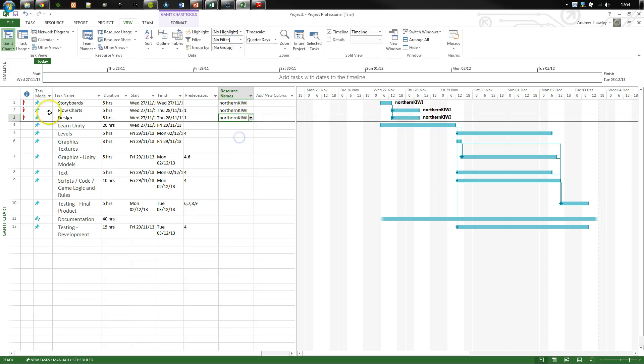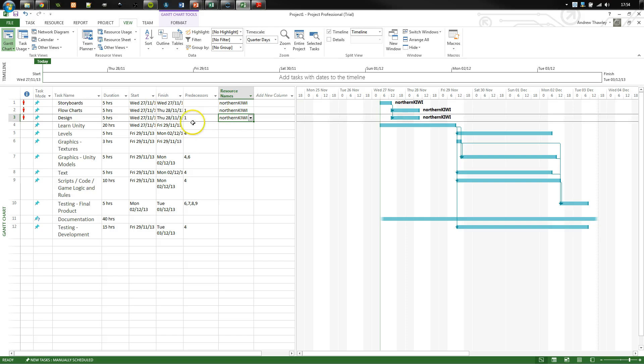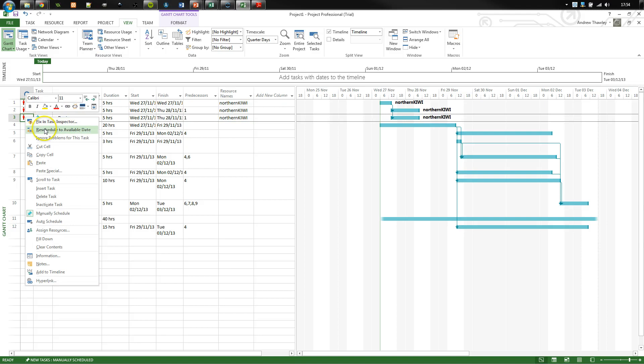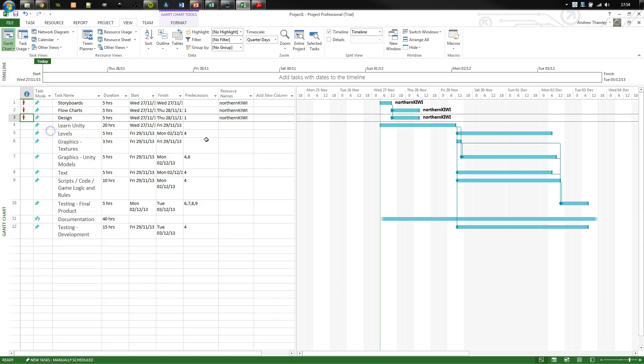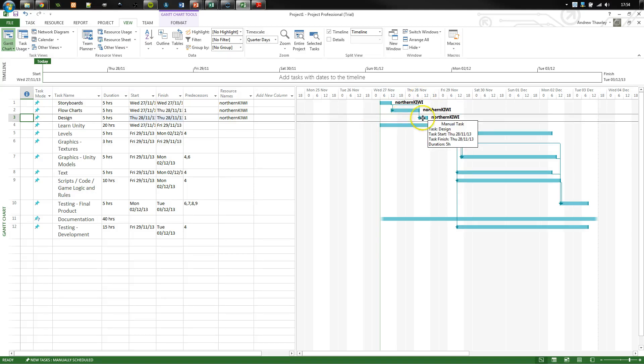We've come up with this little red person. It's basically saying, hey, this guy can't really do both of these at once. So what we can do is if we right click on the person, we can reschedule them to another date. And so that will actually move them down so that we know that they're not working on the thing at the same time.